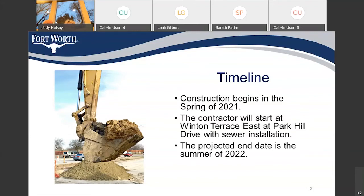The construction timeline: construction is going to begin in the spring of 2021. The contractor will start in Wynton Terrace East at Park Hill Drive with the sewer installation — they'll do all the sewer first, then come back and do the water. Once the water and sewer is done, the road will be patched where the trench was done, and then they'll come back and resurface the street. The project is estimated to take 14 months, giving us an end date in the summer of 2022.